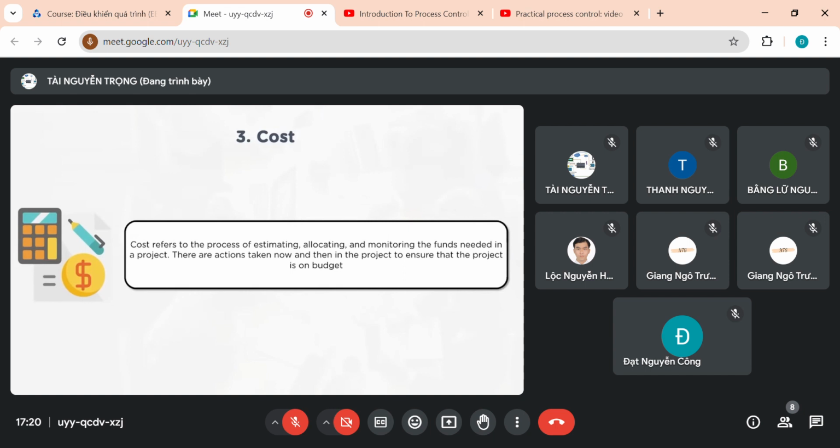Those are compromising, problem solving, smoothing, accommodating. Whichever helps for that project scenario, for the project objectives, that technique has to be taken up. So here the resolution is not at the specific individual's preference. It is with the objective of whether it has any impact on the project. What kind of impact, positive or negative? If it is negative, that's not the direction. The direction should be ensuring the project gets value through this conflict resolution. So the project manager should own it. It's an accountability of a project manager.